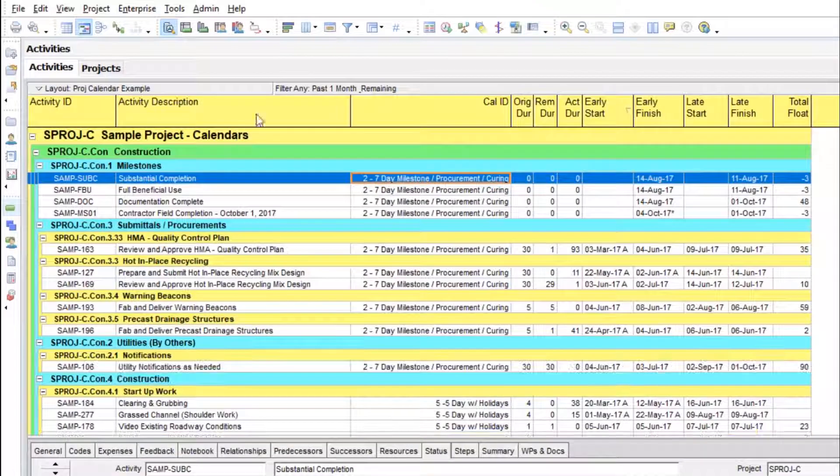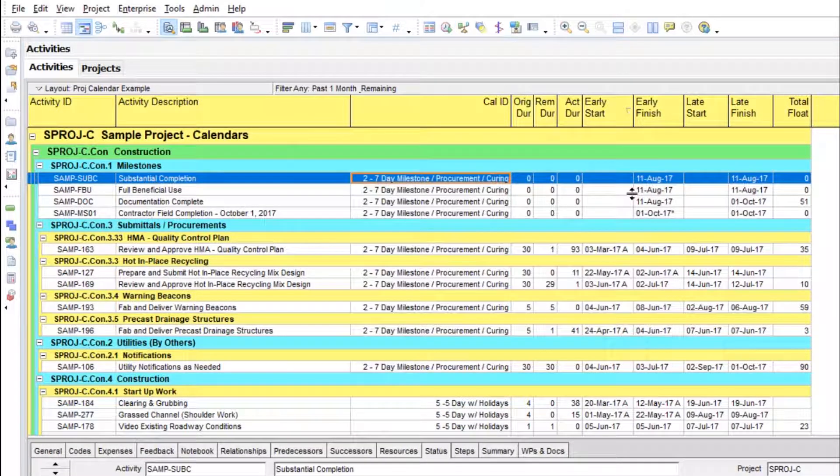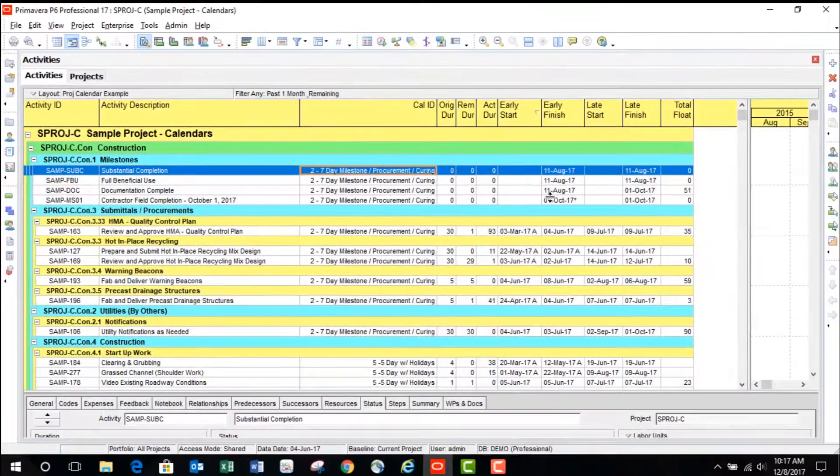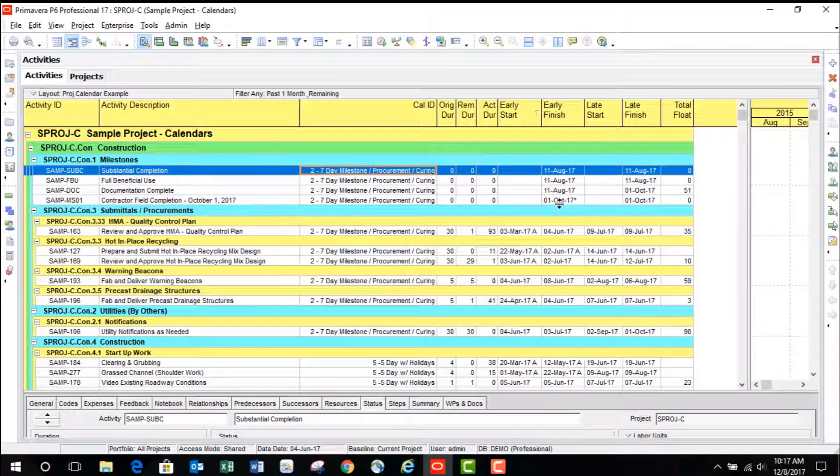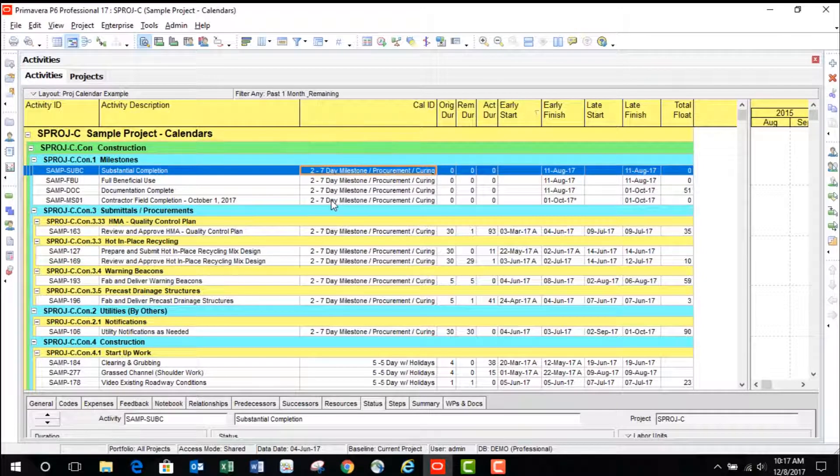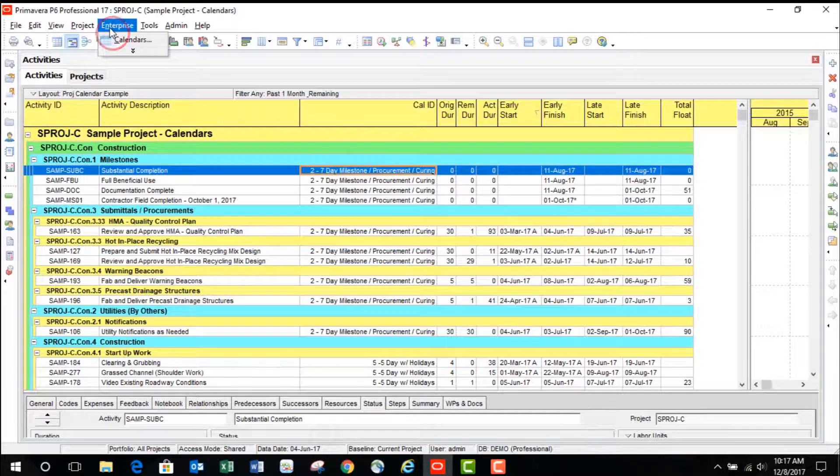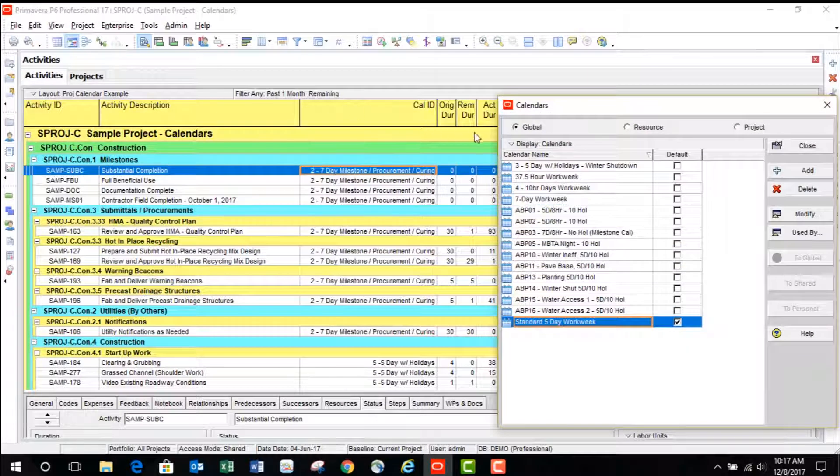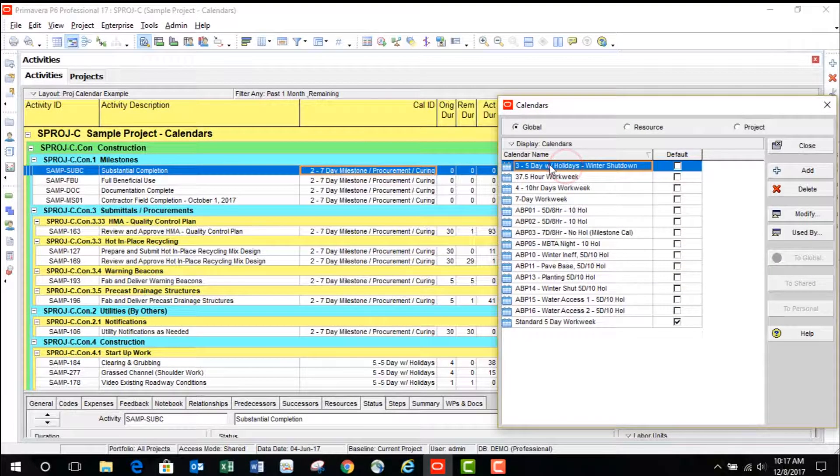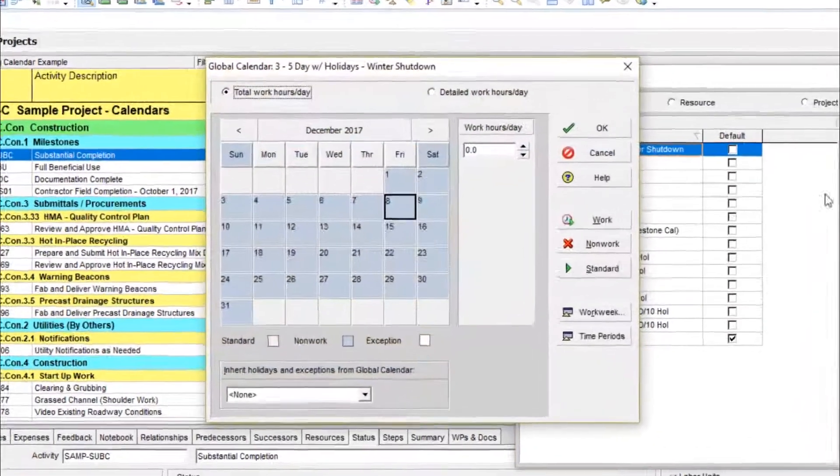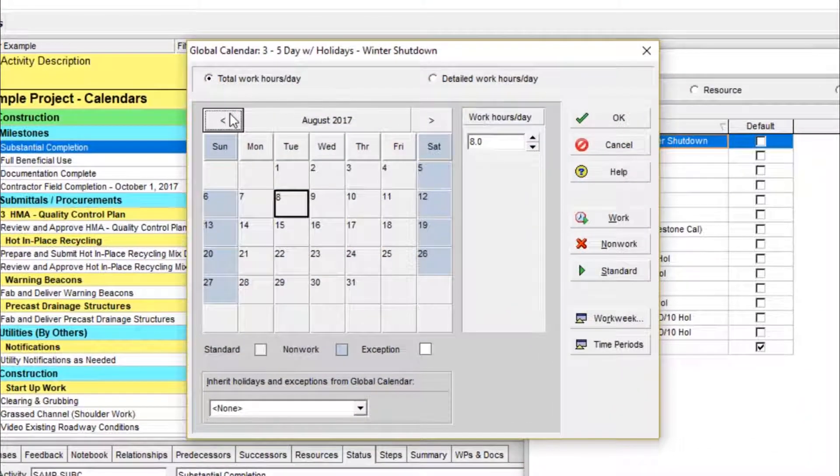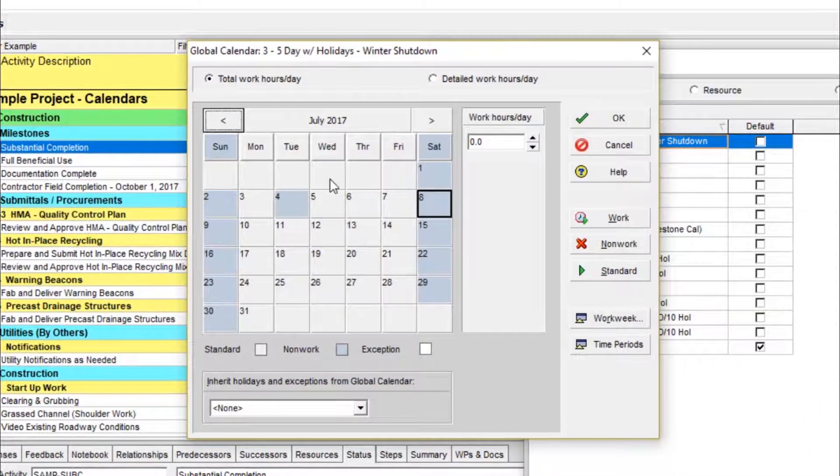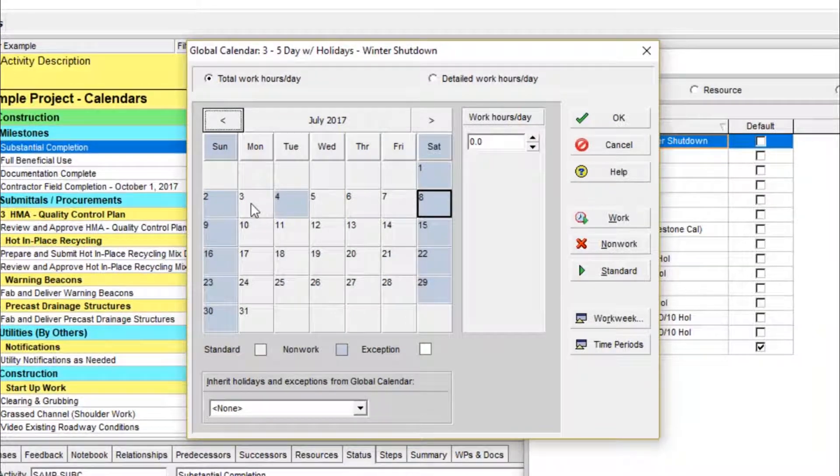Look at the activities. And we always want to start off with calculating the schedule. You can see that we're showing this project finishing on time, October 1st, 2017. If we look at the calendar settings for this particular calendar assigned to most of the construction activities. You can see that July 4th is a holiday, but work is planned for Monday, July 3rd.